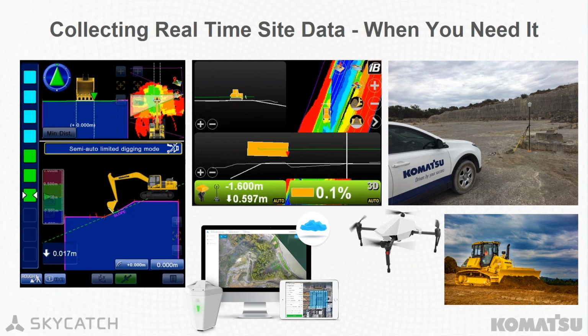If you have a look at the slide here, you can see on the left-hand picture, this is one of our IMC integrated machine control excavators, and the color map in the top right-hand part of the picture shows the as-built collection from the machine. In this case, the green is plus or minus 50 mil. As it gets yellow, orange, and red, that's above grade. When it's blue, it's below grade, a bit like the picture in our intelligent machine control dozer on the right. As that data is collected from the machine, it's uploaded to our SmartConstruction application every 30 minutes.